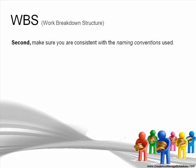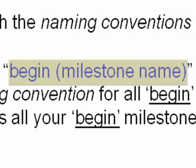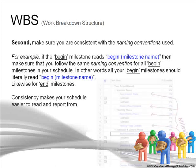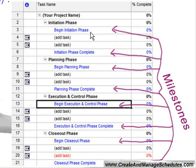Second, make sure that you are consistent with the naming conventions that you use. For example, if the beginning milestone reads 'Begin' and then the milestone name, then make sure that you follow the same naming conventions for all begin milestones in your schedule. All of your begin milestones should literally read 'Begin' and then the milestone name. Likewise for the end milestone. Consistency makes your schedule easier to read and report from. Examples include: Begin Initiation Phase, Initiation Phase Complete, Begin Planning Phase, Planning Phase Complete.